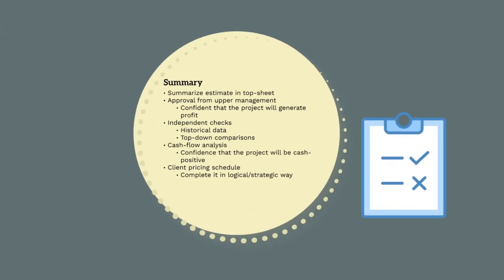Finally, to summarise the estimate, we'll need to go through the process of reviewing and translating our estimate into a format where we can submit it to our client. We'll need to get approval from senior management and have our estimate independently reviewed. As discussed, this will likely happen through top-down and parametric checks. The management staff at our company want to be confident that the project will generate a profit before they submit anything to a client.